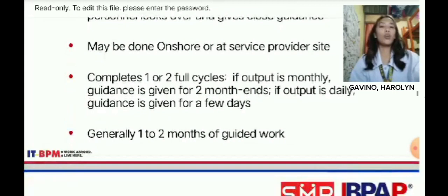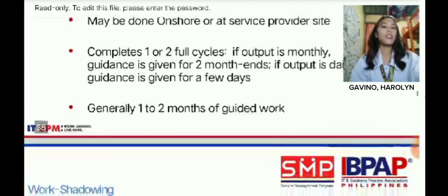Complete one or two full cycles if the output is monthly. Guidance is given for two month ends. If the output is daily, guidance is given for a few days. Generally, one to two months of guided work.